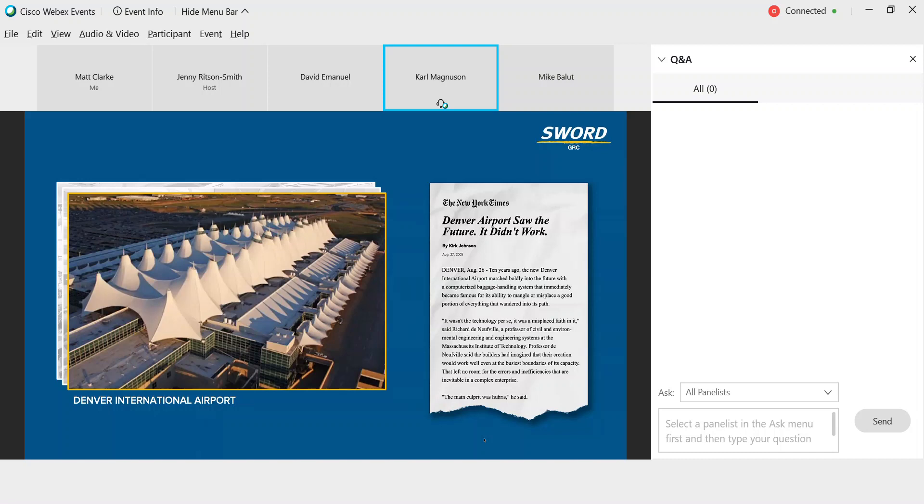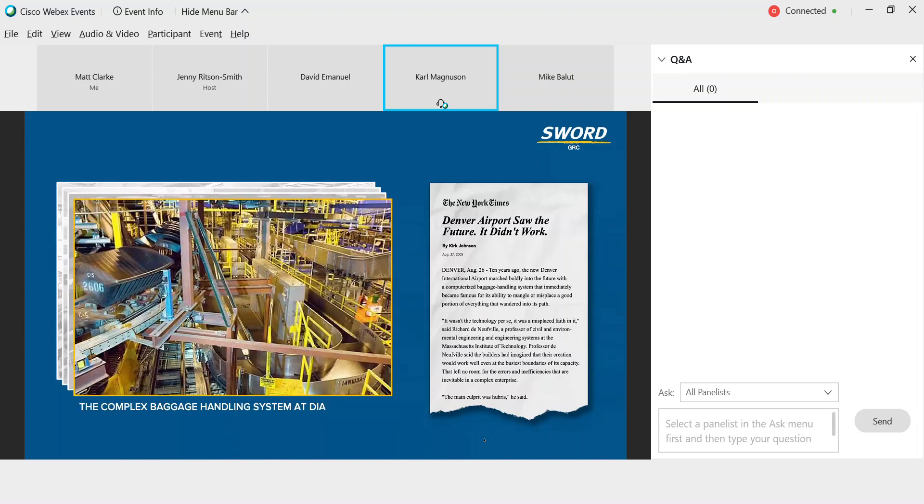It's a similar situation at Denver International Airport in the United States, where a grandiose vision of automated baggage handling systems and complex software failed to work as designed. The New York Times article put it this way: Denver Airport saw the future and it didn't work. The airport was left vacant for 16 months while completely replacing the baggage handling system with simpler, more reliable equipment costs an additional $560 million.